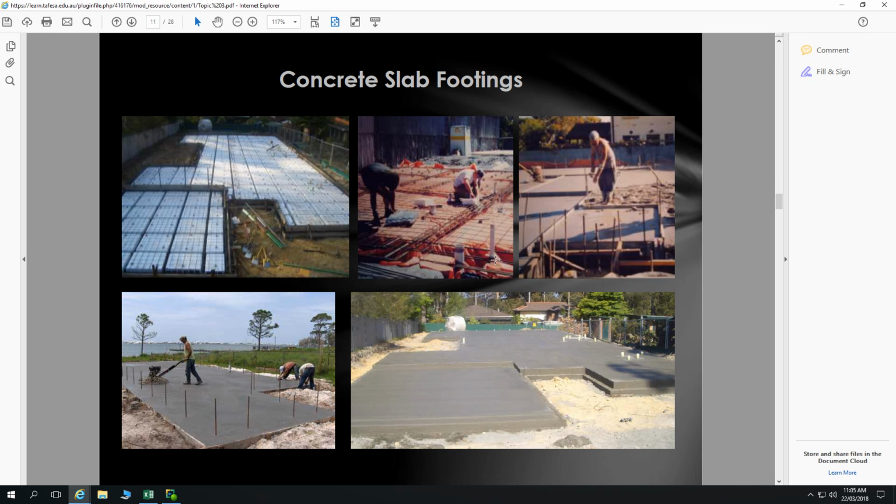I'm interrupting you. One stage we are missing, that is the termite mesh. Yeah, great. Thank you. I see mostly the sites, they need to fix it after the steel fixing before pouring. Great, thank you. That's a really good thing you pulled me up on. So before we pour our concrete, we want to ensure that our termite protection's in place. Well, we can't really do that afterwards.